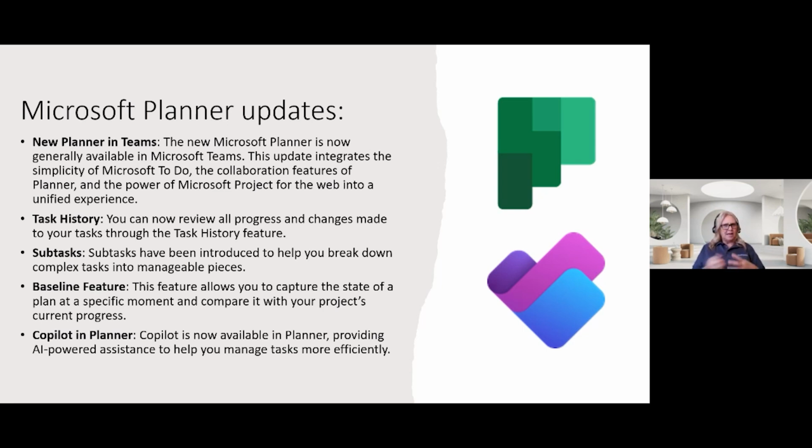2 months, 3 months, because sometimes we're working on projects for a long period of time. It also has baseline features built in, which is super exciting. I always save copies of baseline so I can do comparisons with variations from this start date, it changed to this start date, so we have a variation of 2 days. It does all of that now. So we don't have to go someplace else to have the capabilities of an actual project management tool. It's a lot more than just a task list these days.